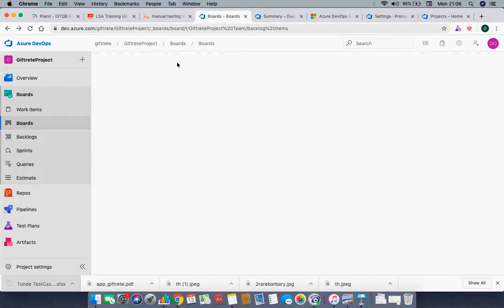You break your requirement into chunks. Let's say you're going to design a website. You can take the login part and say, let us do only login, only registration, only the posting, only the edits, and the admin. You put them into different chunks, bring them together, and look at what you can do within two weeks. In two weeks, what are the things that you want to do? That becomes your sprint backlog.